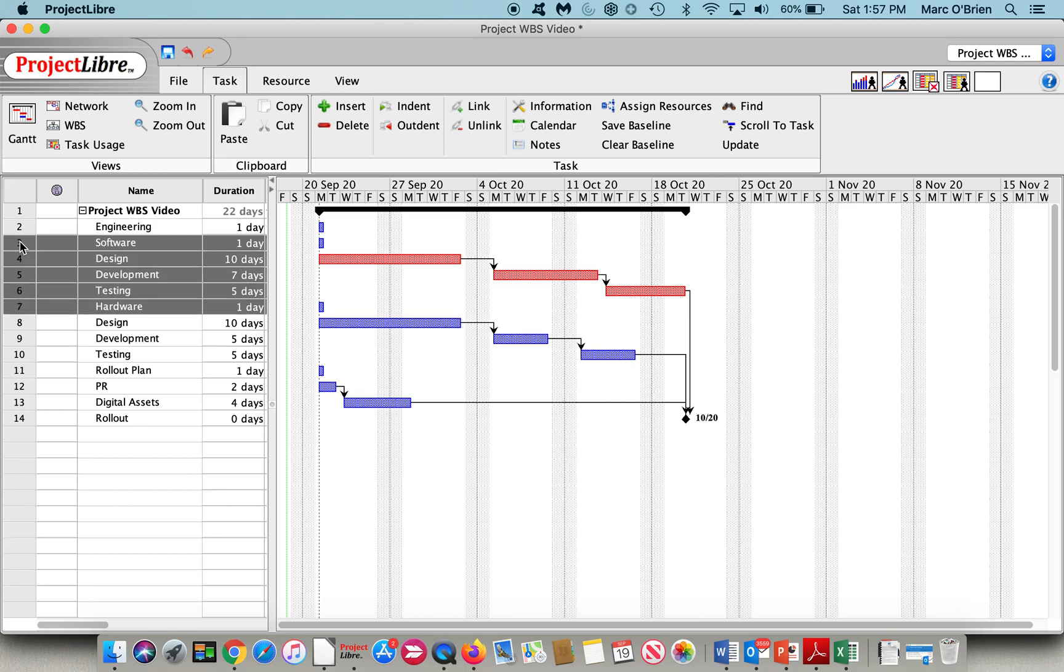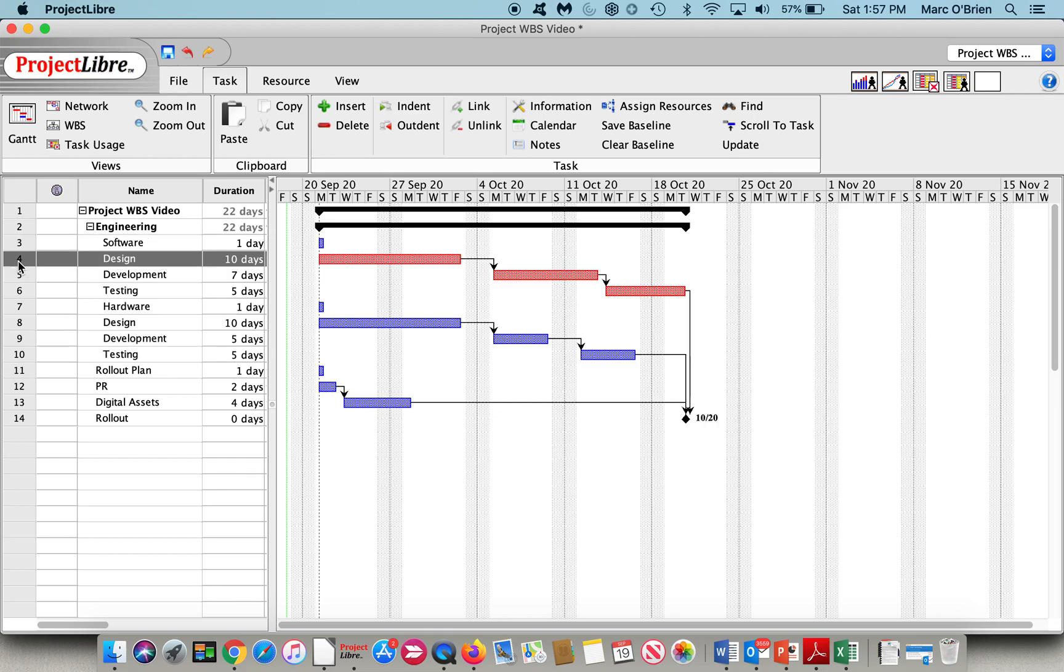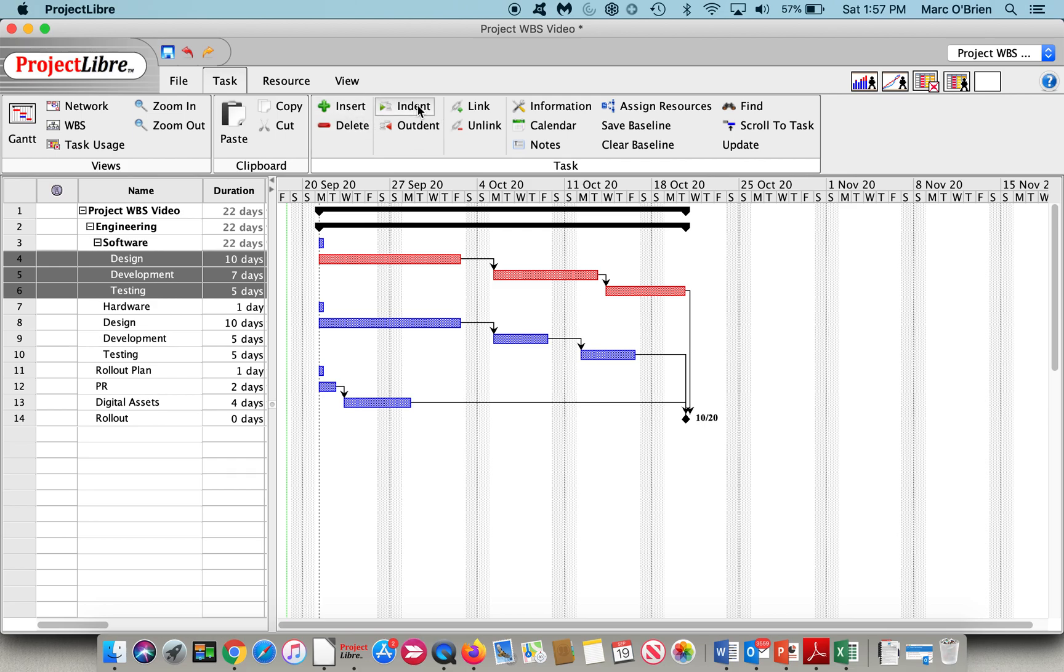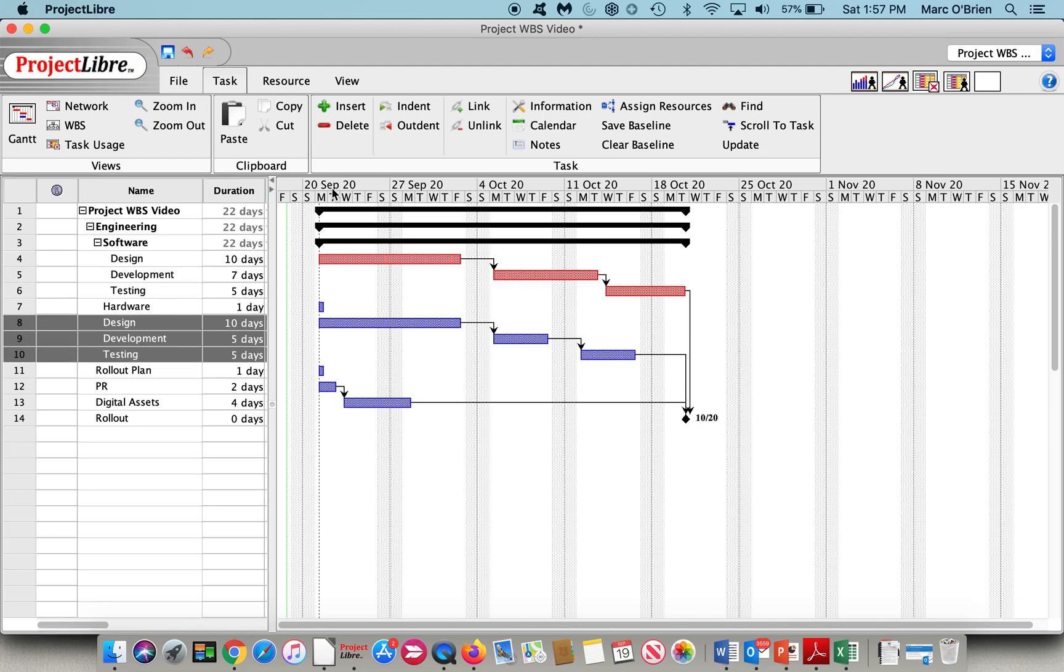Under engineering, I have software and hardware engineering, and a series of tasks below each. I will highlight all of those and indent them under software design, development, and testing are going to be sub-tasks, so I will indent those. And then under hardware, I've got design, development, and testing of hardware. We'll indent those.